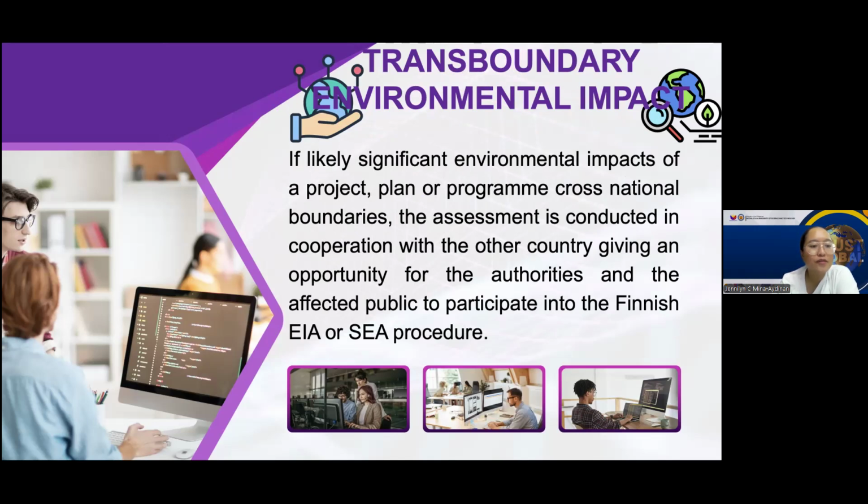So a forest development project in one country may affect air quality or water sources in a neighboring country. The Finnish Environment Institute would inform Finnish authorities and the public if the project might impact Finland, allowing them to participate in the environmental impact assessment process. So both countries would cooperate to address and manage any potential cross-border environmental issues.